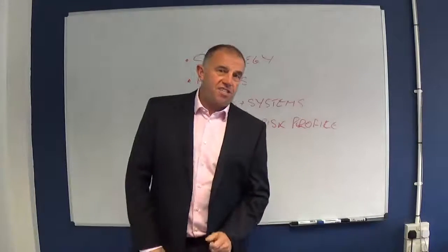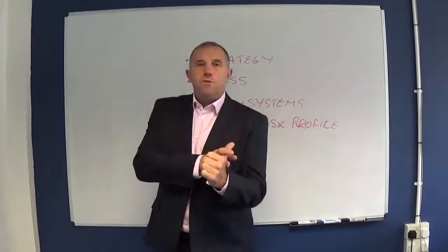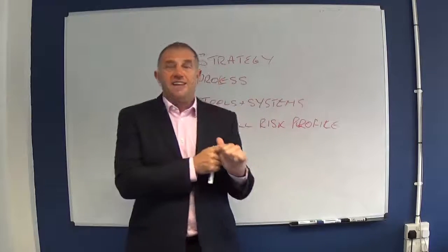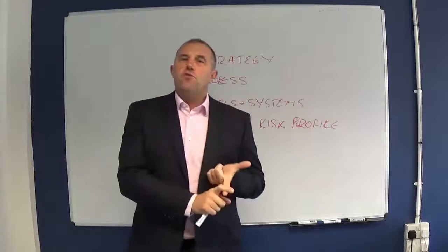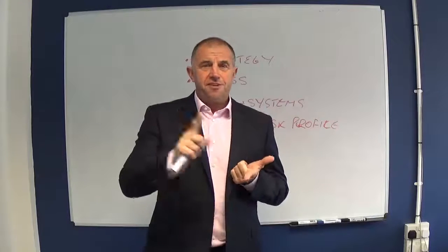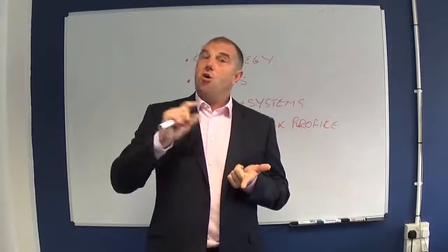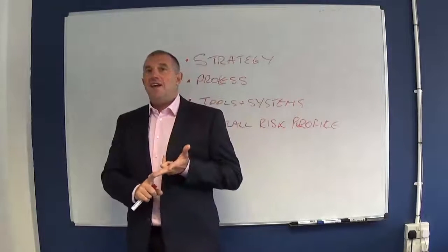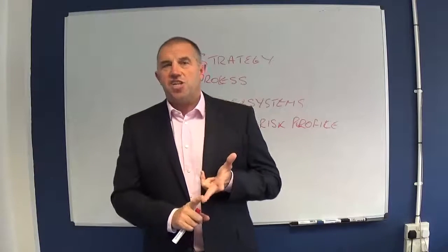So the areas that I would suggest you look at: competence. How good are your people? How good is your organisation at delivering programs? Novelty. Have you done it before? If this is the first time you've done this type of program, or any type of program, the risk is higher. Complexity. How complex is this change going to be?